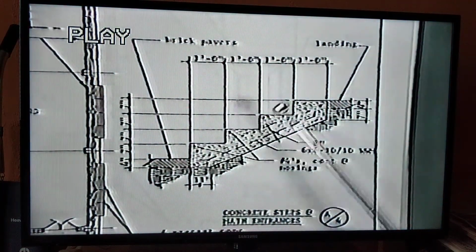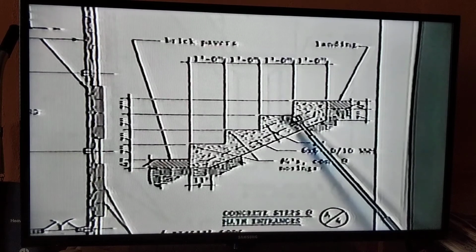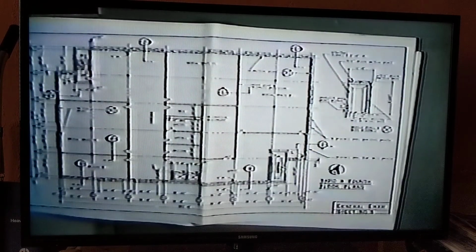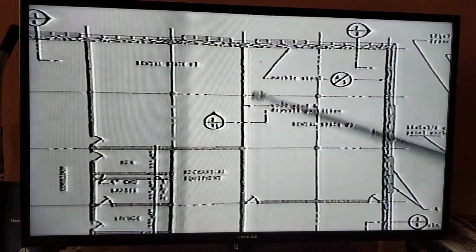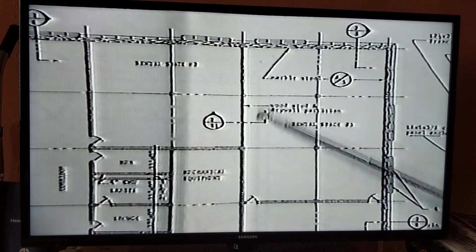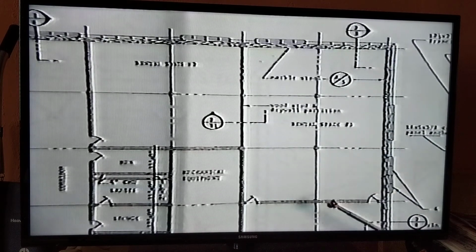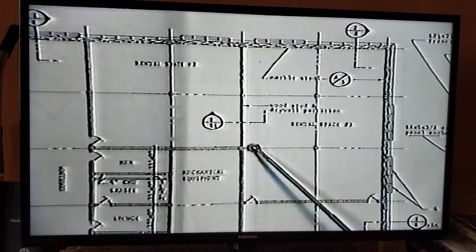this riser piece, and this riser piece, and that would tell us the square foot area of lumber we would need. Sheet number 5 shows us the third and fourth floor plan, and once again we have the wood stud partitions here. And we have to remember, though, that if we find a measurement or a calculation off of this sheet, it's really covering 2 floors, and that's where the test might catch us.